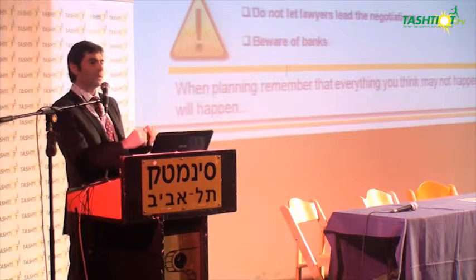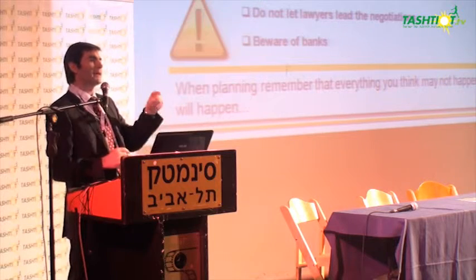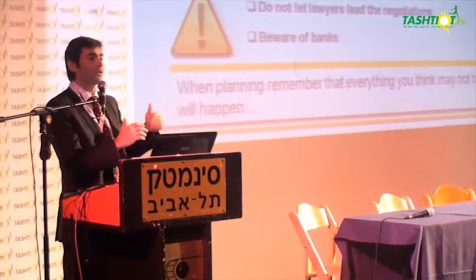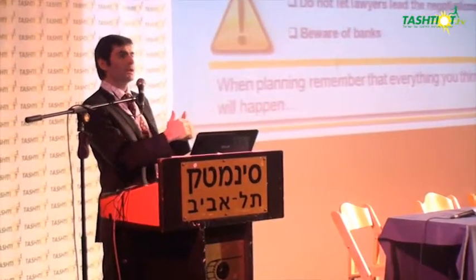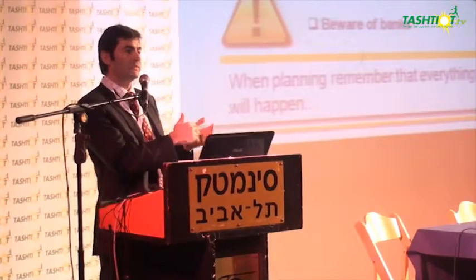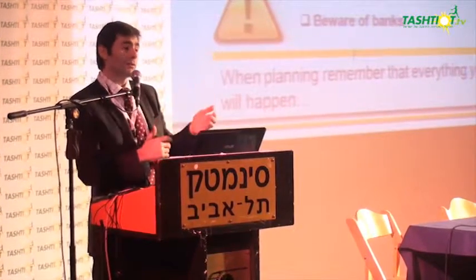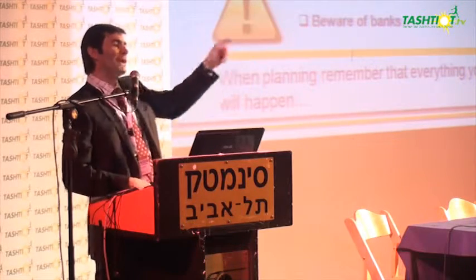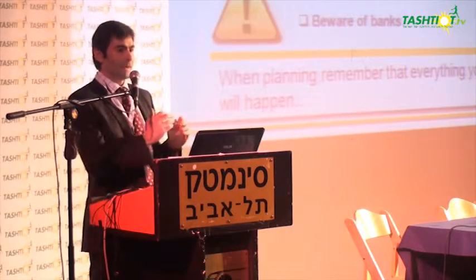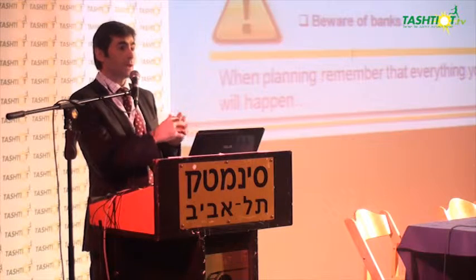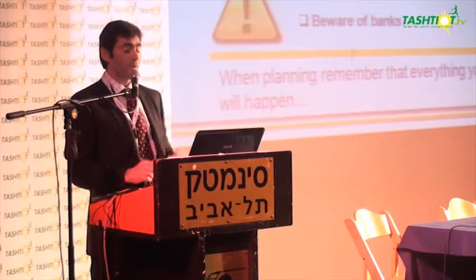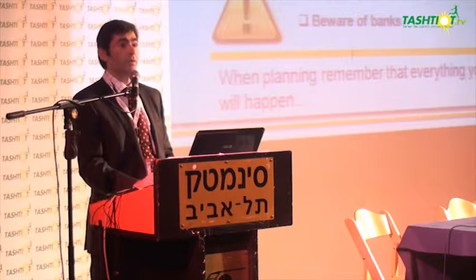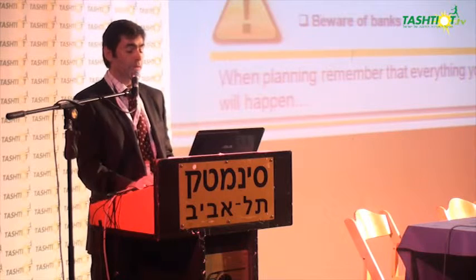First you finish the milestone, then you tell the client, then the client tells the technical advisor. The technical advisor has to find a time when to go. He goes there, he checks everything, he makes sure you have achieved the milestone. Then he has to write a report, send the report to the client, the client sends it to the bank, and then a week after you get paid. So all this is a lot of time in the end. So be aware of the working capital you're going to need, and watch out with the high tension. So those would be my 3 main tips.